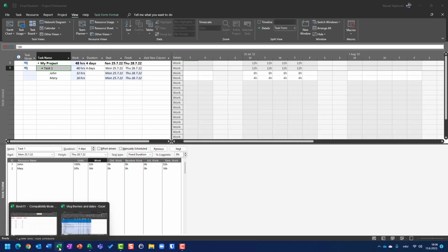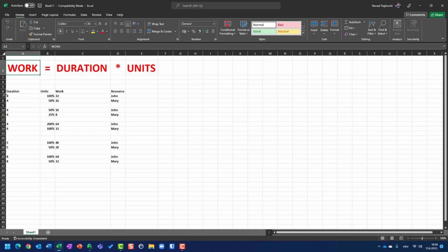So let's go here once again, and you can see 4 days, John is going to work 100%, 32 hours, because duration multiplied by 8 hours multiplied by 100%. Duration multiplied by 8 hours multiplied by 50% results in 16 hours for Mary. Okay, now, if you want some further explanation of how the calculation is done, please watch my previous video where I explain fixed units task type.